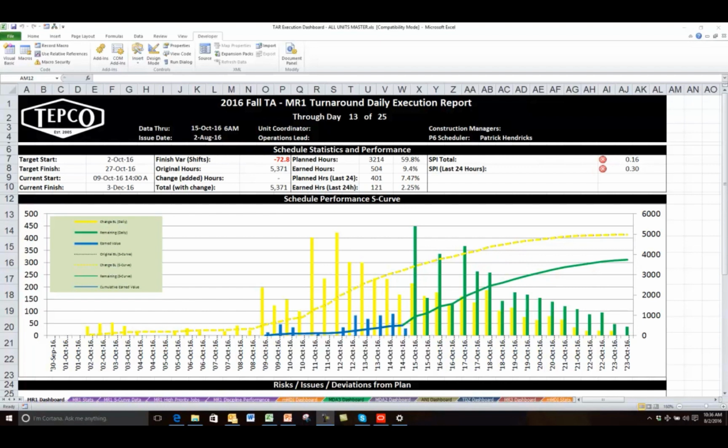But now if that happens, 5 minutes before a meeting, they can bring that status in. I can put it into P6, run the batches again and run the macro again, and still make the meeting with the data that I need. So there's quite a benefit to making sure that you have up-to-date status in there, especially if someone brings in some status to you late. Not that we want to promote that. You should have a deadline for them to have the data there. But if it does happen and you can acquire some status at the last minute, using the P6 batches along with an Excel macro will really speed things up for you.